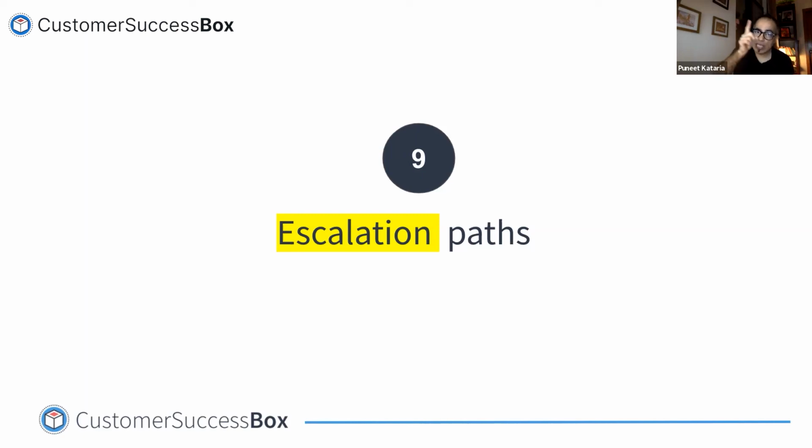Similarly, having an equivalent escalation path at your customer's end. What if your SPOC stops responding? What if your SPOC actually makes a commitment and does not fulfill it? First thing, you remind them of the deadline. Second, you tell them the deadline is overdue now and you've missed it by a day, missed it by 2 days. Still no response. A new deadline comes and they say, oh, we're going to take 2 more weeks.